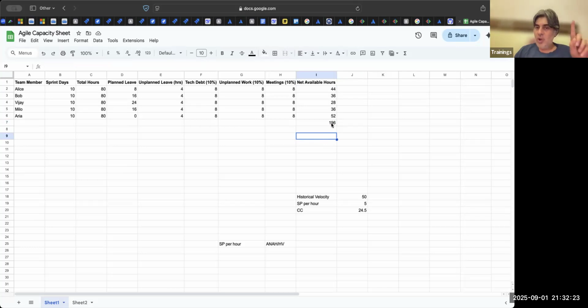So one, total number of hours divided by whatever you have mapped. If it is 8 hours, then I would divide 196 by 8, which is roughly 24. If I did a mapping of 8 points, then it was 25 points I can take up. But if I did a mapping of 6 hours, I can take up 30 points of work. Again, these are rough estimations. Then eventually how you will get better at it, I will show you today.